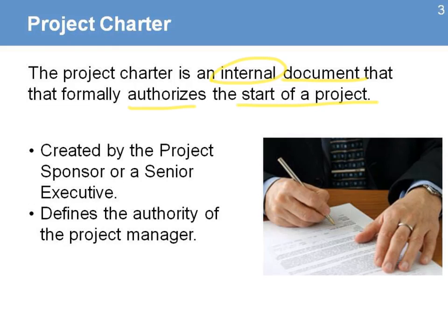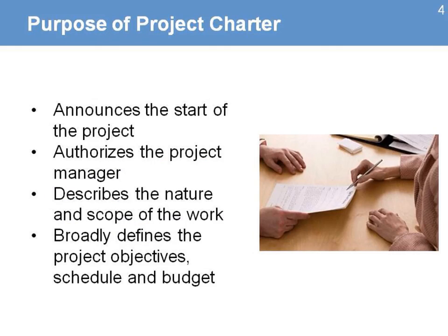It is created by a project sponsor or senior executive within the organization and defines the authority of the project manager. The purpose of the project charter basically is to announce the start of the project. Once the donor has agreed and there is a contract, the charter helps announce the beginning of the project. It also authorizes the project manager to begin the project.